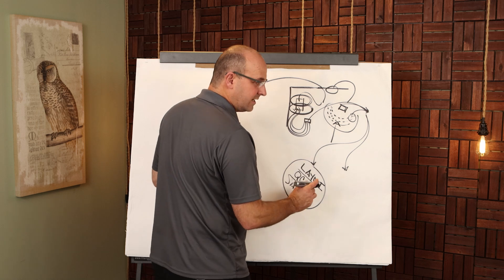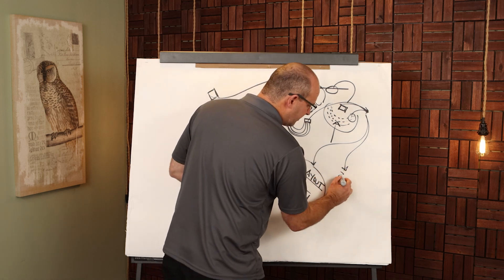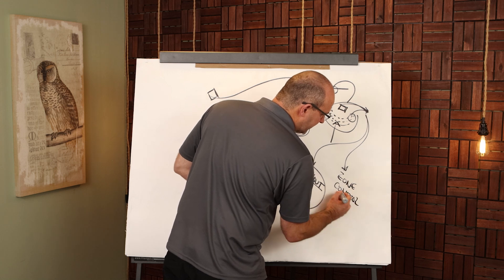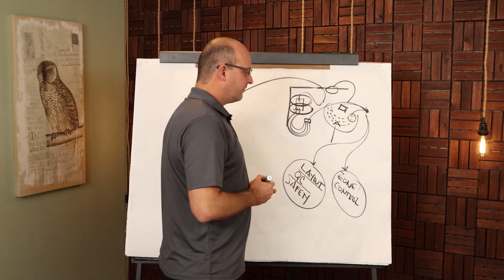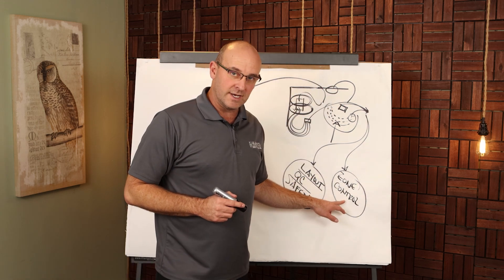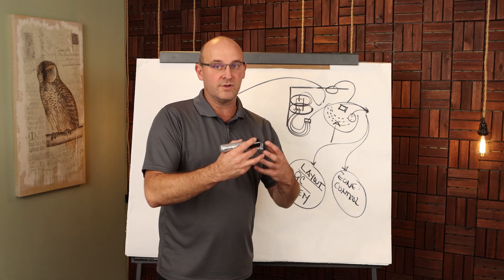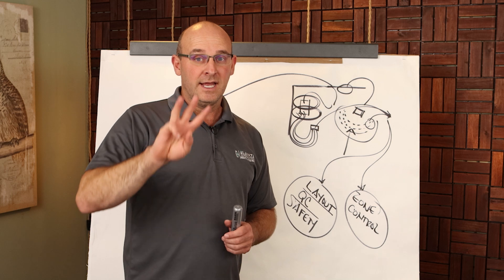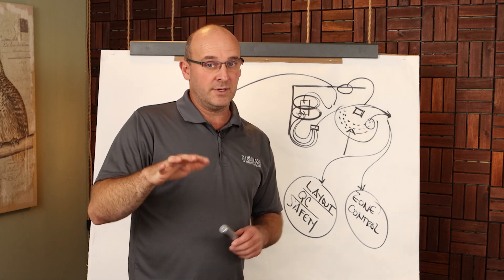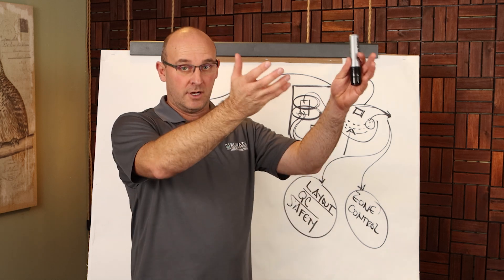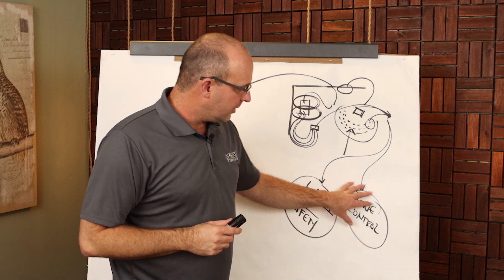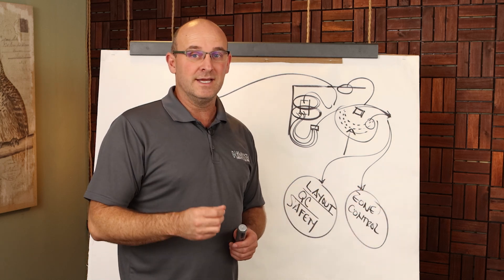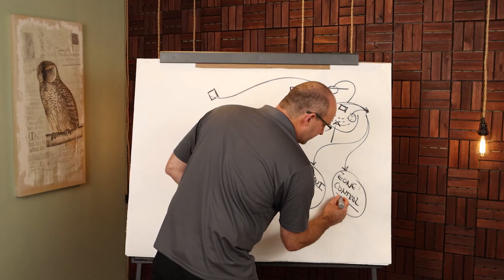Then what you'll be doing is called zone control. What this means is you are helping the project superintendents and the foreman to check zone handoffs where trade partners are moving into forward positions, to QC right then and there, plan out ahead, help the trades with problems not because we look down on them, it's because we look up to them and we're supporting them, and so helping that superintendent to make sure the handoffs are happening properly is absolutely key.